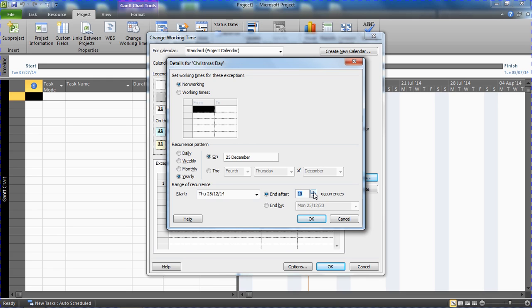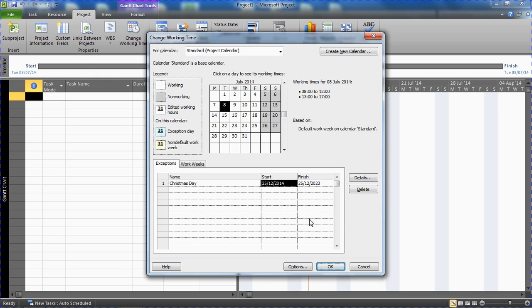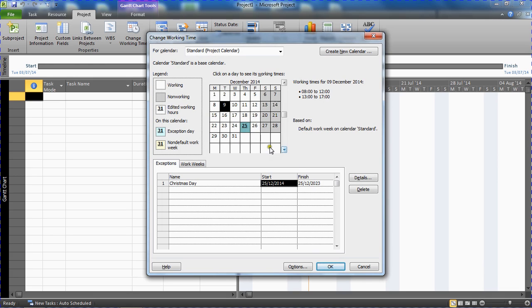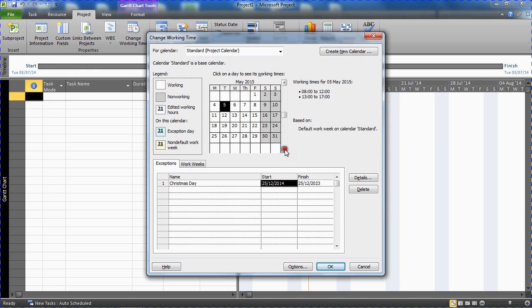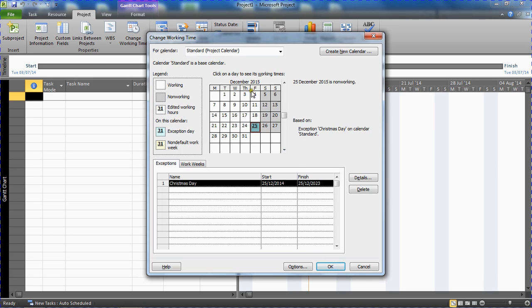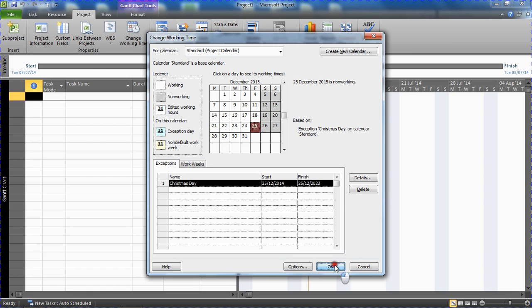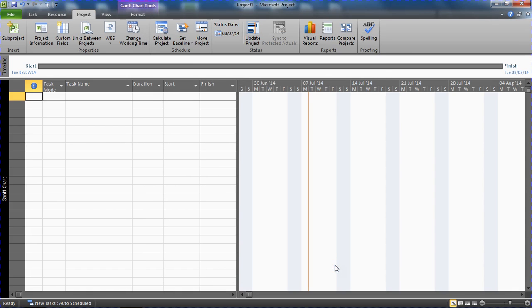So I'll leave that as 10, click OK. If I scroll through this calendar in the top half, we can see that the 25th is recognized as an exception, as a non-working day there. If I scroll through a bit further, I can see that in 2015, no surprise, the 25th occurred on a Friday there, but still recognized as a non-working day if you have projects, or maybe this project, lasting that long. Okay, let me click OK at the bottom to save and close that so it applies it to this project.